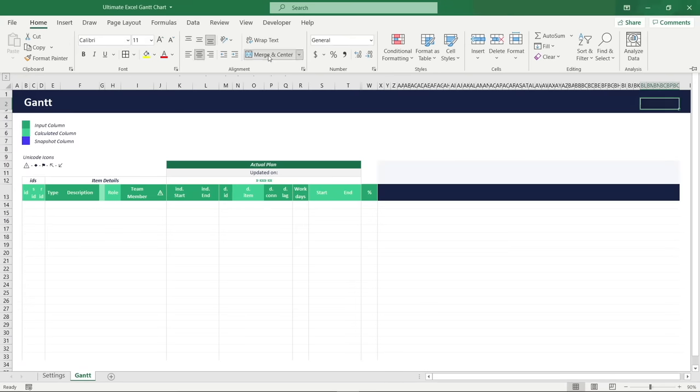We overwrite the stage and task items with the original int_start dates, leave the milestone defined via int_end date, and quickly set up a plan for the second stage — with the stage and first task using forward scheduling, and the other two tasks using backward scheduling. You can see the bar now grows backwards as we increase the number of workdays. For the milestone it is enough to only provide a date.